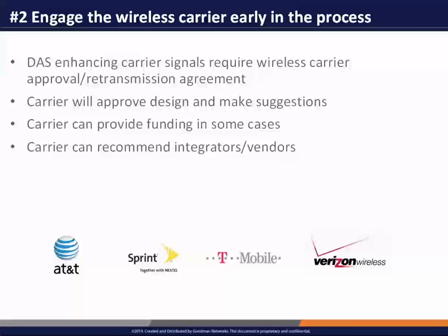I mentioned funding, and the key here is funding in some cases. While they do have robust funding budgets, the funding of the DAS on a campus is not necessarily a slam dunk. Quite a lot of financial analysis is required. There's going to perhaps be some participation by you or a neutral host or a third party, but there are budgets available, and at a minimum, the carrier will provide, in most cases, the RF signal source.